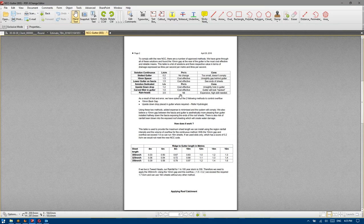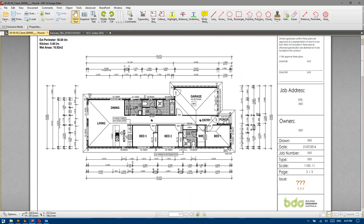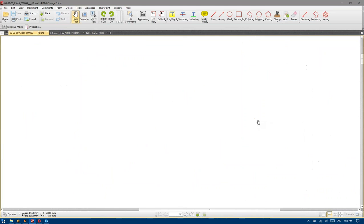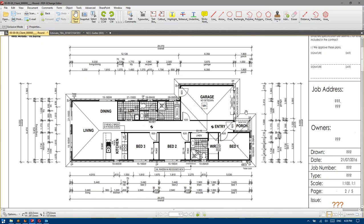So one idea that we have come up with is getting stormwater hydraulic designs done on each and every single one of our homes, some time after contracts are signed and before construction. So effectively our contract set of plans would be devoid of downpipes but would merely have a note saying downpipes to future hydraulic engineer's detail, and maybe write something up in our specification. We have historically always included them on contract sets so that if a client doesn't want it on their front porch they know they've got to suck it up because we're not moving it.